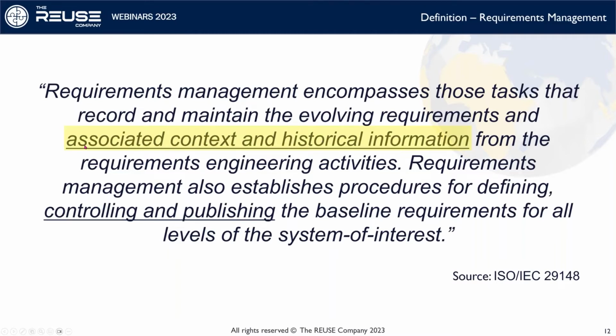And this is specifically true because there will be probably more associated context to the requirements than there would normally be if you would do everything in-house. Another thing that's mentioned in here is that you should be controlling and publishing the baseline for requirements. And publishing is essential again here, because this is what you typically would use as a contract enclosure, a contract appendix, technical specification, another specification for the system to be developed.